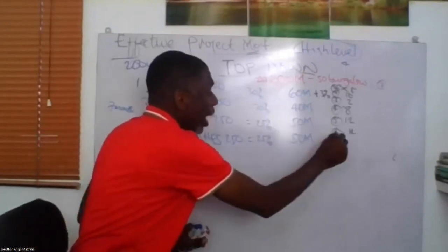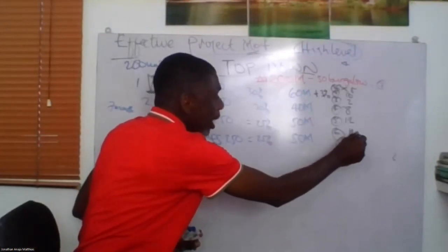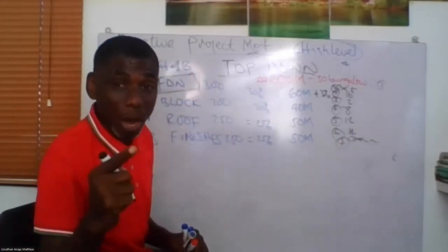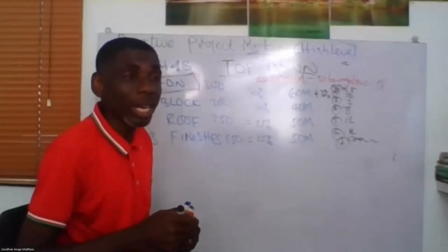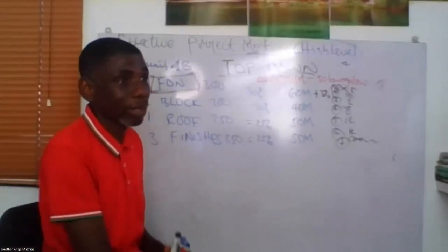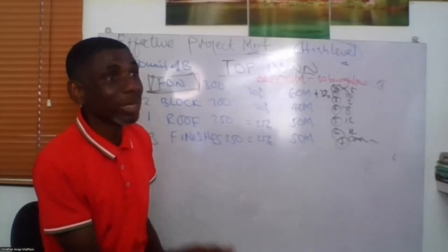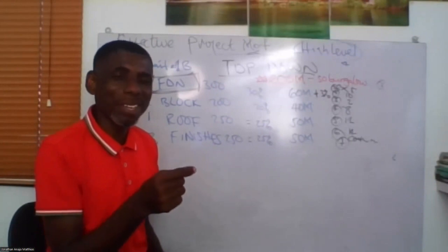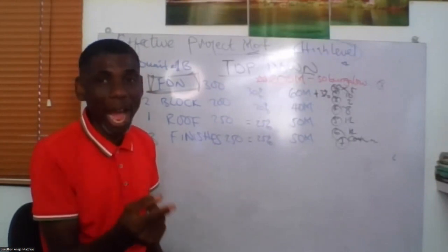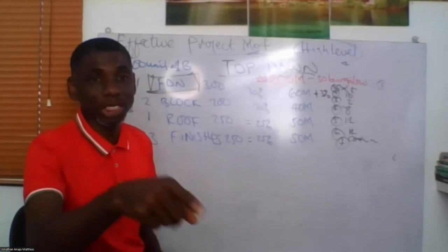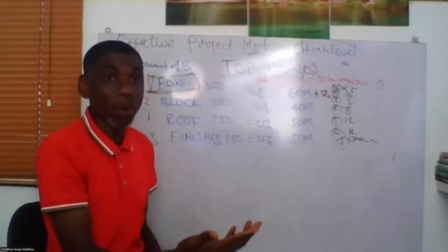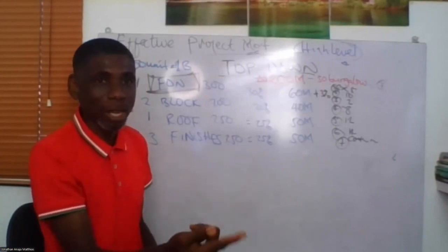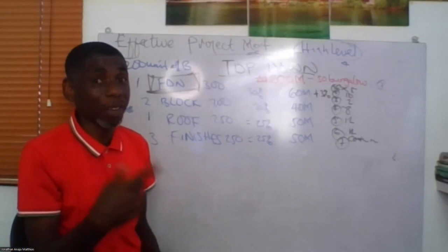You can create even an item 7 that's maybe like a contingency reserve that is based on past data that can be objective, so that you don't have issues with your accountants and your auditors. You must be able to objectively tell them why you have a contingency reserve of maybe 3%. You have your past data, so they can say, oh, it's true, you spent over by XYZ%. So you need to create a contingency reserve of XYZ%.